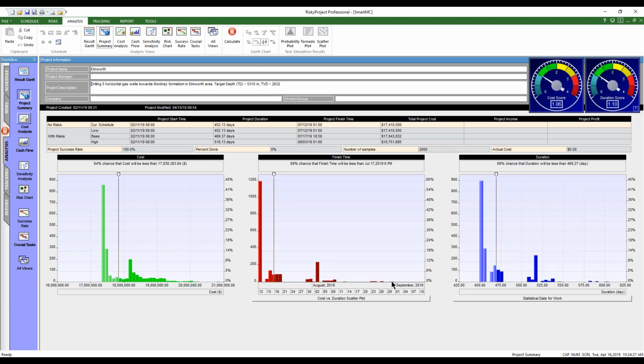And if you did it 100 times, you'd see that, without a major risk event occurring, you'd still have quite a level of variance, which we could describe as a histogram. That occurs just because of the natural variance in all of the processes. If we don't account for that, we're going to miss a large amount of the variance or risk in the system.